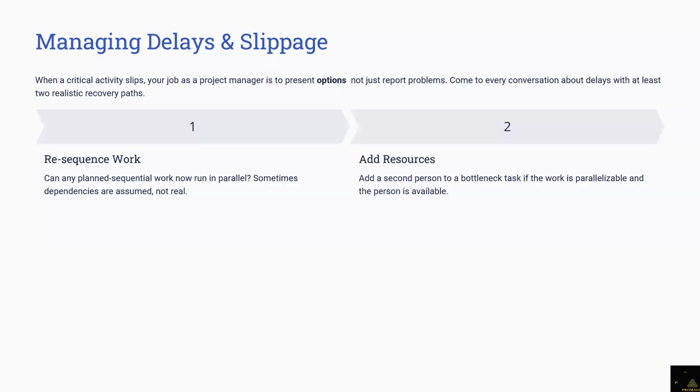So if someone decides to work 14 hours because we are not going to meet the deadline if we continue at 8 or 10 hours, and starts working 14 or 16 hours a day, it still does not affect the cost, because you are still paying them at the same rate. That's my own consulting environment. But when I was working in the construction field, overtime rates were totally different, something like 1.5. So does that significantly affect the cost?